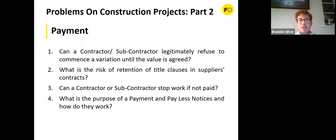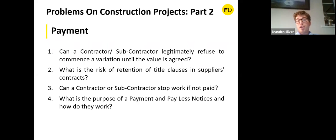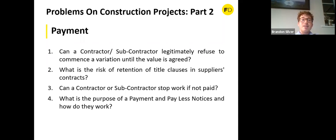Moving on to payment. The first question: can a contractor or subcontractor legitimately refuse to commence a variation until the value is agreed? The short answer is no — unless the contract specifically provides for it, which is incredibly rare. The JCT contract, for example, provides a mechanism for working out the valuation of variations but does not permit refusal to commence a variation until the value is agreed.